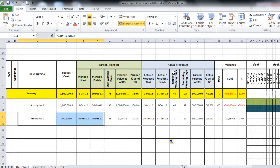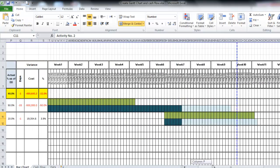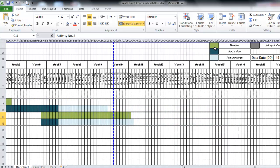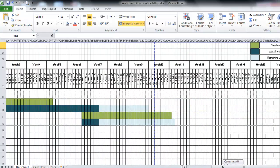In the Gantt chart we have the target plan, actual forecast, and the variance between them. We have some color coding here: this color means baseline or plan dates, this color means actual work already done, this color means remaining work, and this color means holiday and weekend.